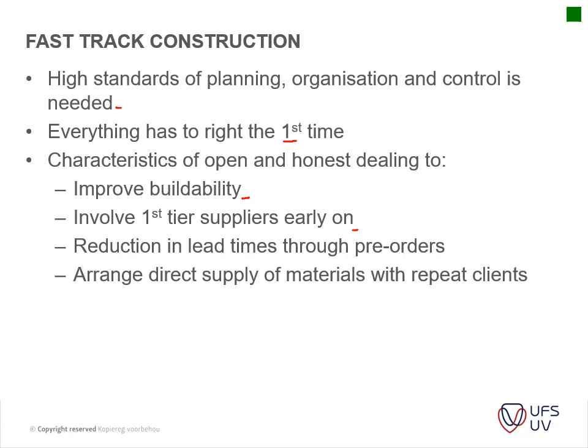Reduction in lead times through pre-orders is very important. Arrange direct supply of materials with repeat clients. Okay, clients who actually know what you want. You don't have to get samples and so on beforehand, for instance, because you've got a relationship with these suppliers.